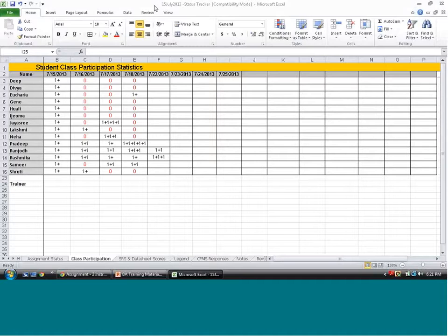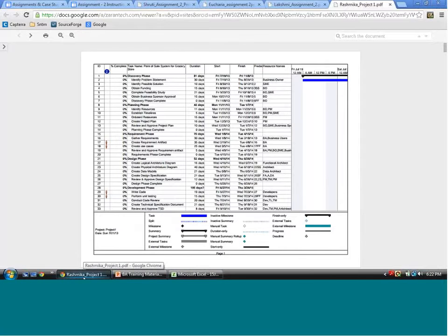But can somebody please give me an example to illustrate triple constraints? The example will be, if I'm organizing a birthday party, I would have 5 days to get ready, and my resources, I would have certain people helping me, 5 people helping me, and my boundaries will be I would only spend $500, and I have to balance that to manage a good birthday party.